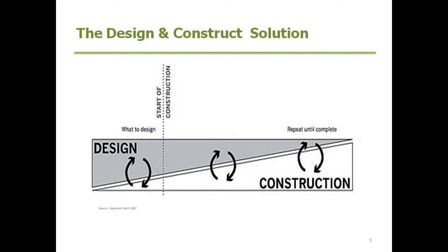The difficulty with this type of project, more often than not, is that because it's not well defined and scoped at the beginning of it, and the builder takes a bigger role in the process of variations and payments and defects, the end result is not always the quality that the client expected, and so that's possibly a trade-off or a negative with this form of contract delivery. But commercially, and for those larger projects that need a speedy delivery, this is often the alternative to traditional forms of contract.